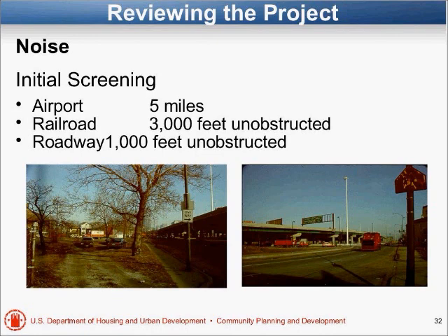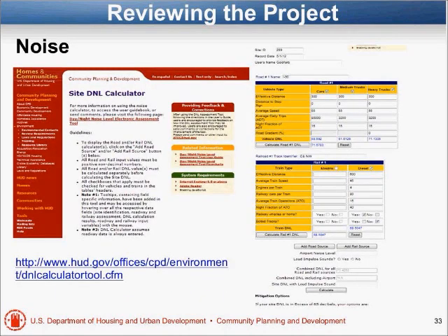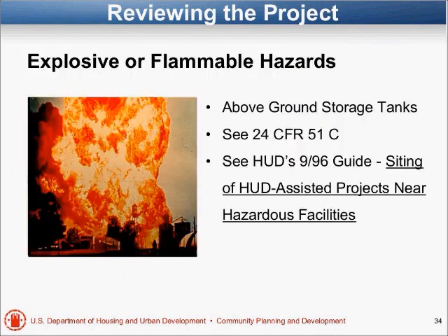It's one where you can get traffic data on it from your highway department. And if you have one of those, you're going to have to at least do a noise assessment, which I'm going to show you in a few minutes, the HUD site, that you just plug in all this information, the distance, the traffic, the speeds, and it'll tell you what the noise level is and if you have to do anything about it. Another thing that we might have to look at is explosive or flammable hazards.